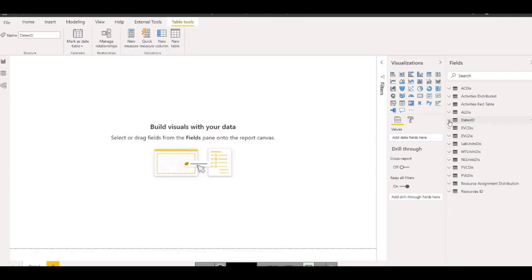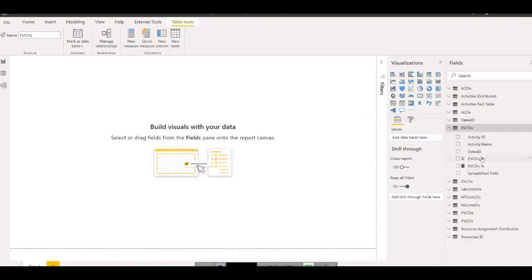And guys, this you need to select, and you need to make one understanding where you want to put your KPIs, because there are so many tables, there are so many columns, so you should know where you have put your KPIs. For example, cost related KPIs you can put here. Cost related KPIs means measures, and the calculated columns you can put into earned value, cost, and actual cost, and planned cost. So you should decide where you have put. I usually practice that I put all the KPIs into earned value, so that all my SPI, all my CPI related to cost, EAC, VAC, estimate to complete will be here. So I every time know that they are here. So we need to decide.